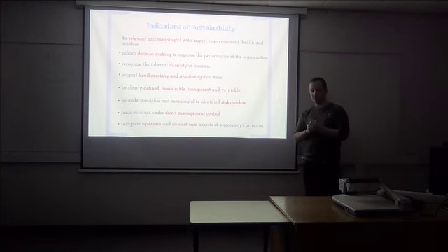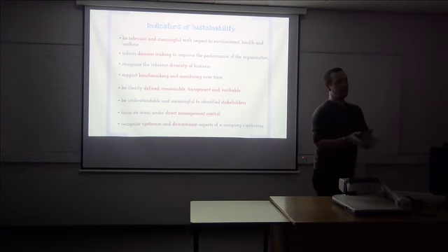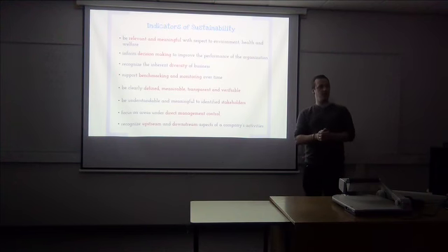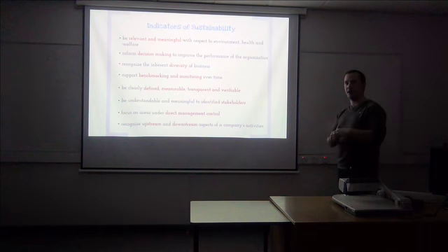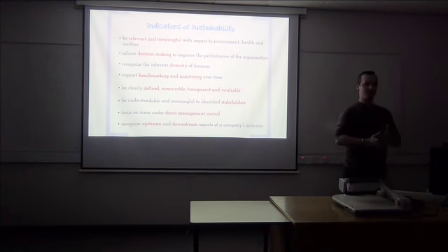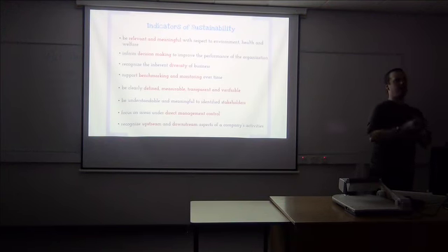So if you're talking to the local community about how you're going to reduce their energy bills, you're saying, well, we're progressing towards our indicators to make sure that we're going to reduce your energy use. And we've reduced your energy use by 0.25 kilowatt hours per metre squared of your building. What? No, you want to use ones that they can understand. We've reduced your energy bill by £6 per week.